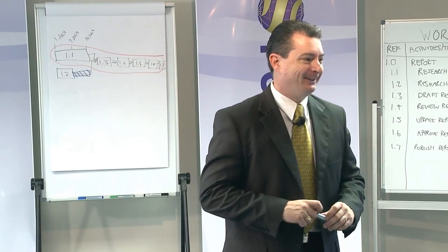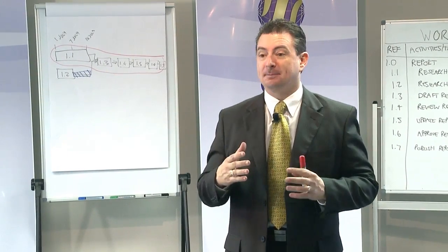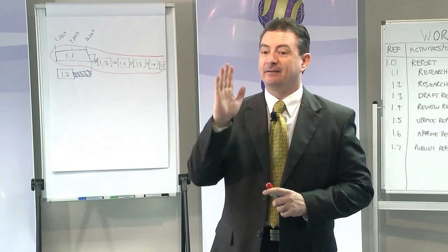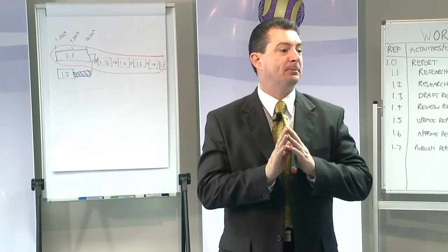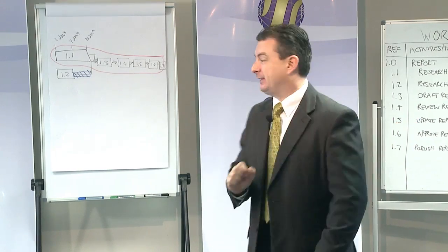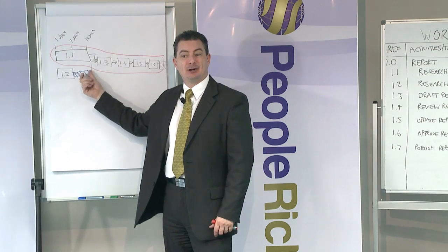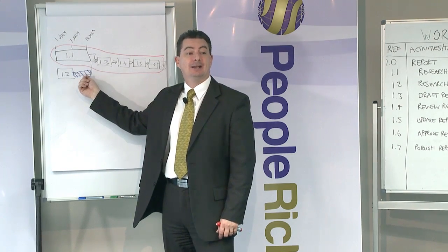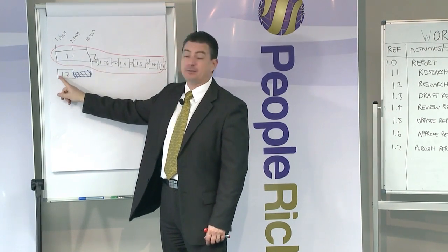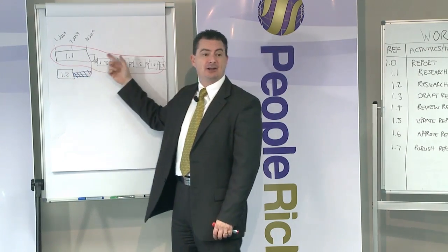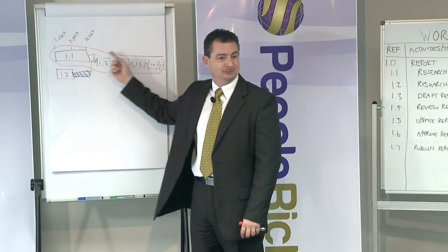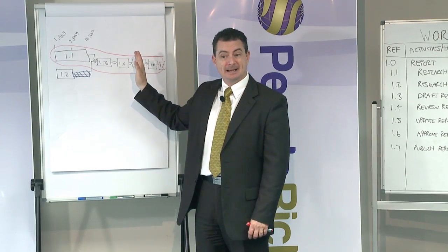No, in all seriousness, we use the critical path because we know automatically that if anything on the critical path is late, the project is late. Why do you think we didn't want to leave no float there? Because as soon as you push it down there with no float, you've just put it on the critical path. If we started on the first day and it was 2 days late, is it actually going to impact our project's schedule? No. Does everyone understand that?